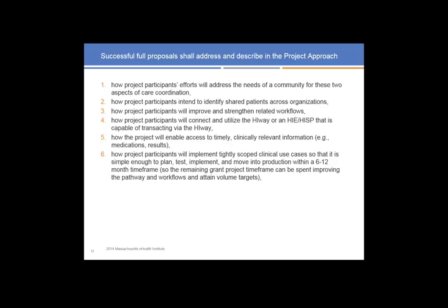how the project will enable access to timely, clinically relevant information, how project participants will implement tightly scoped clinical use cases so that it is simple enough to plan, test, implement, and move into production within a 6 to 12-month time frame. In this sense, if that's year 1, that allows the remaining grant project time frame, year 2, can be spent improving the pathway and workflows and attain your volume targets.